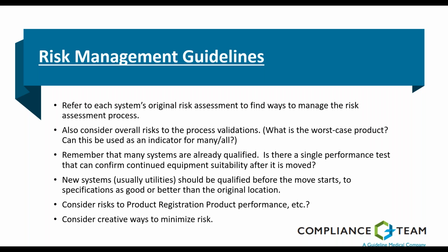And then we had a limited amount of temperature mapping that we would have to do, because we had justified that if the temperature ends up being the same in the new location, we already said that the utilities were adequate and such, that we didn't really expect that many of those controlled temperature units would fall out of spec. One or two actually did. So that was a nice validation too, because we could show that the method that we had planned was actually able to detect any anomalies.